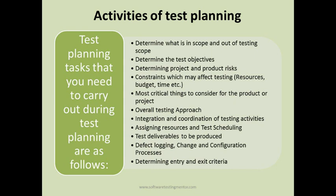Additionally, the defect logging, change, and configuration process needs to be mentioned in the plan. For example, if you are using Jira or Bugzilla for defect tracking, or another tool for requirements management, all tool information goes into test planning. Finally, determining entry and exit criteria for testing activities is also part of test planning. These are some of the most important activities you need to carry out before writing the test plan.